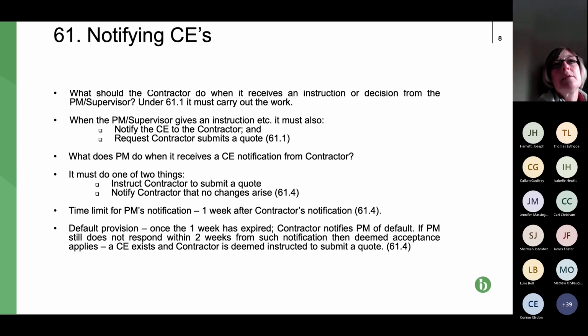Quite often what you find is that project managers are not agreeing on things as they go along, but their intention is to try and negotiate a resolution at the end, which isn't in the ethos of NEC. NEC is all about sorting issues out now, so the employer, the client, has some certainty. But that's often not how it works, which is why we started off with the slide about this potentially being one of the most problematic areas of NEC.